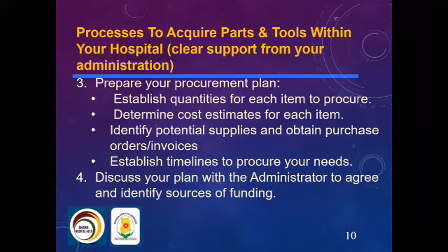And the lead time means that if you are planning for the whole year, you need to plan such that your lead time is considered. You know that those items may finish in, let's say, 4 months, so you need to start your procurement earlier so that you don't run out of stock. When you run out of stock, you're not able to carry on your jobs properly.